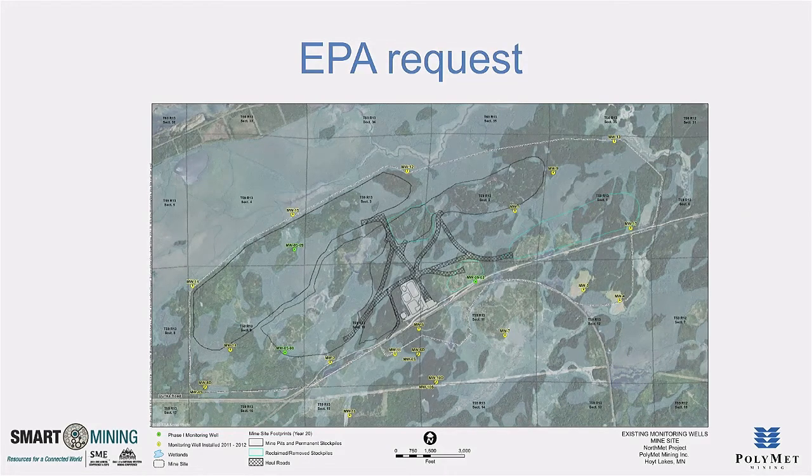So that's an example where the original consultant was right, but we needed someone else to do a peer review. We had to have the litigation folks come in, and as much as we hated it, we had to adjust our process, and we had to change our thinking and do more. But as a result, we have an NPDES permit now.